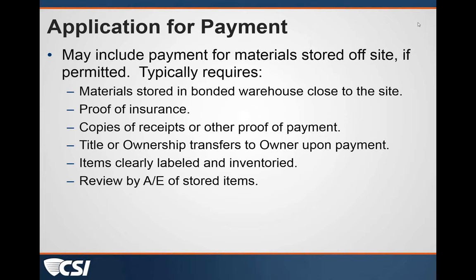And so when you're establishing how you're going to, if you're using AIA documents, certify pay applications for a warehouse full of plywood 10 by 10 boxes stacked to the ceiling, then it's pretty critical to get that established up front. And you don't find yourself in a spot where you're obligated to do this because your contract didn't specifically cover that sort of review. I can't express enough how important it is for you to lay your eyes on what you're certifying. And in the next webinar, we're going to talk a little bit about that and maybe share some horror stories.